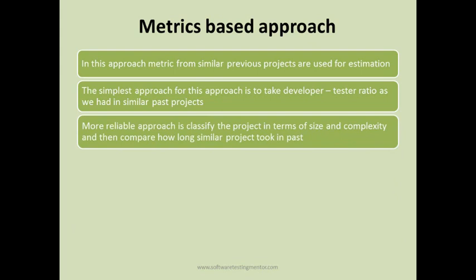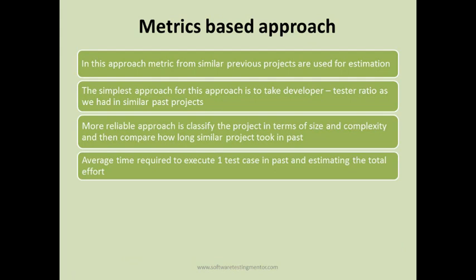So a more reliable approach for the metrics-based approach is to classify the project in terms of size and complexity, and then compare how long similar projects took in the past. So this is more reliable. What size was the previous project, what time did it take, how complex were the functionalities in the previous project, and then you can compare the same with the current project and estimate that. Then, take the average time required to execute one test case in the past and estimate the total effort. So this is another approach in the metrics-based approach.